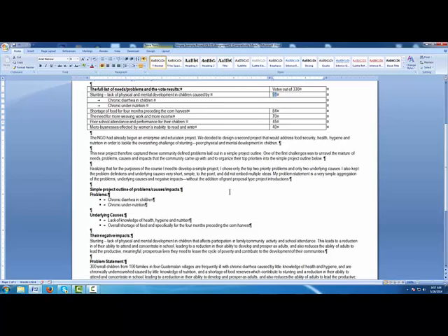You might want to take a moment right now to differentiate problems from causes and negative impacts before pasting in your problems. For example, my community members identified stunting as being their biggest single challenge. However, the 2 underlying causes beneath stunting, chronic diarrhea and chronic undernutrition, are more human scale and compelling, so I decided to use them as my 2 project problems. So simply copy from your chart and paste into your problem outline.